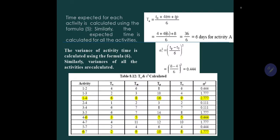First, we have to calculate the time estimate. For the time estimate: T0 plus 4TM plus TP divided by 6. For activity 1 to 2, we will take T0 is 4 plus 4 into 6 plus 8 divided by 6. So T is 6. For calculation of sigma square, this will be (TP minus T0) divided by 6 to the whole square. So (8 minus 4) divided by 6 to the whole square will come out 0.40. Similarly, we will calculate for each activity.